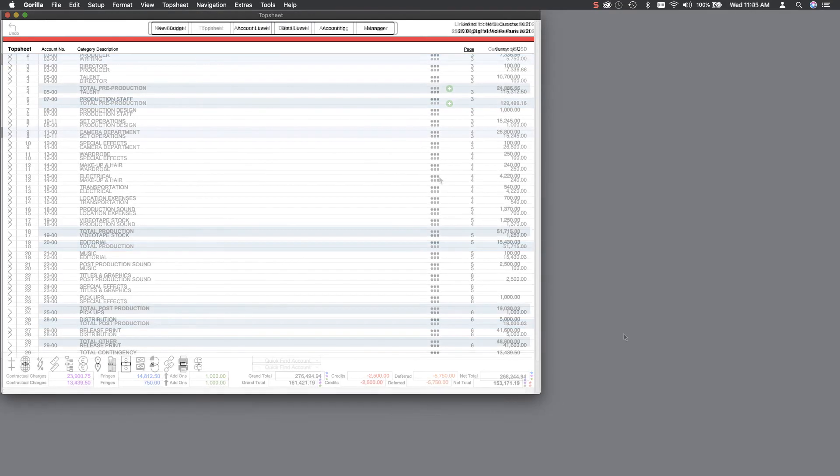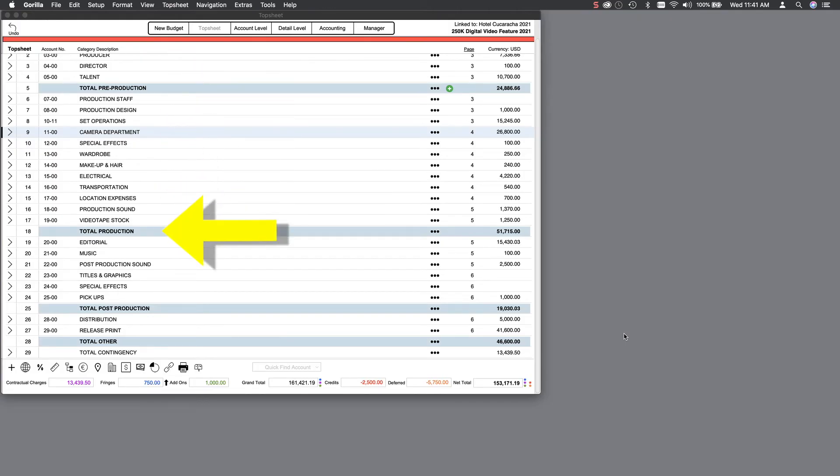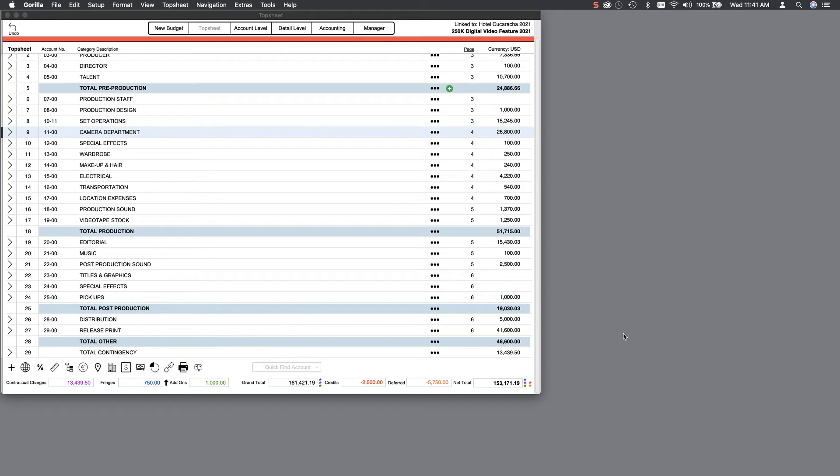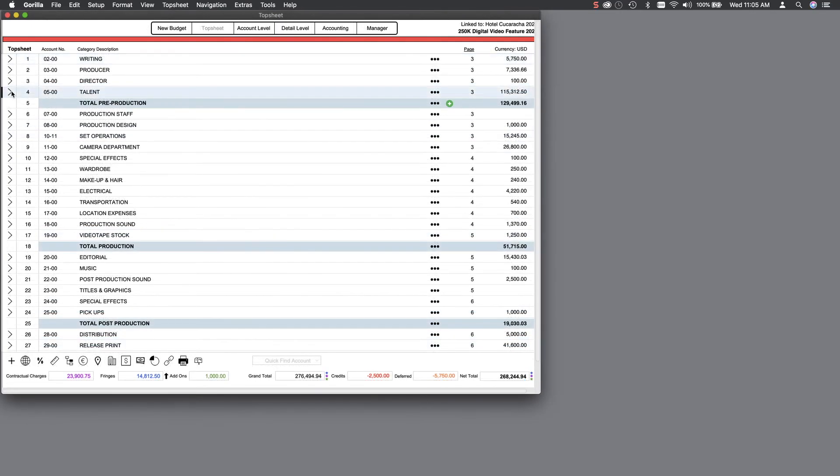As you can see, this budget is divided into four sections: pre-production, production, post, and other, which is typical for a film budget. Everything in pre-production consists of costs prior to the start of shooting, mostly above-the-line costs as known in the film industry.